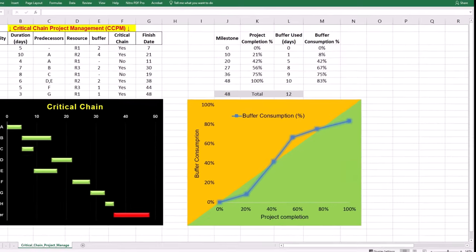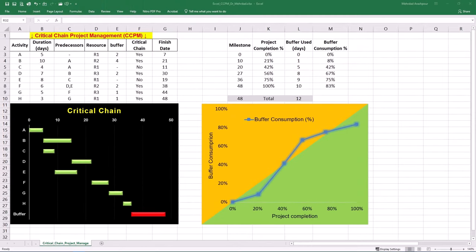Step 3 is creating feeding and resource buffers to manage uncertainty. Feeding buffers protect the critical chain by adding extra time to non-critical paths that connect to it. In our project, two non-critical activities C and E connect to activity F in the critical chain. Activity C has a duration of 4 days and activity E has a duration of 8 days.